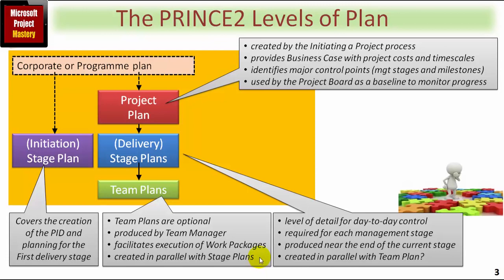The project manager will give out work packages, and these team plans may be optionally used to help agree that a work package is realistic and feasible, and also as a baseline against which to track work package progress.